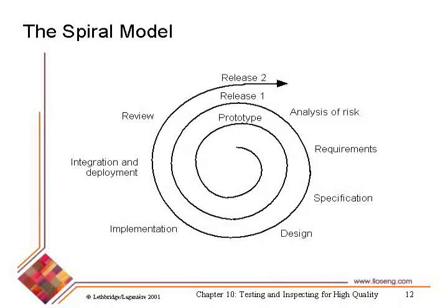And that's your first prototype. You do the same thing for release 1, release 2, release 3, release 4. So effectively what we've done is we've taken these waterfall steps and we've put them around this circle, and we're going to be going around this circle over and over and over again. The first few times around the circle are prototypes, and then we have real releases. Okay? And each release is going to follow the same process.